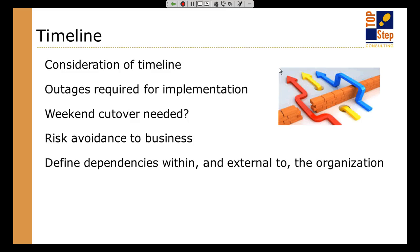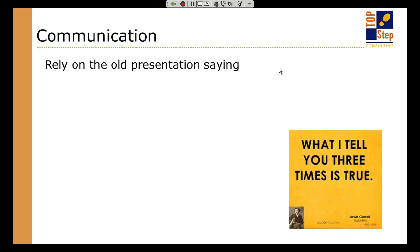There are also organizational dependencies — a few organizations we've worked with had entire departments unavailable, and they were key to the rollout, so you have to set your timeline around that. The tricky part is the timeline does not dictate the effort. Something that's going to take about 12 weeks to roll out could only require two or three weeks of actual effort, but takes 12 weeks to accomplish because you need to coordinate, deliver training, follow up, and measure adoption. That 12 weeks is more of an adoption window than an effort window, so getting the timing right is very important.